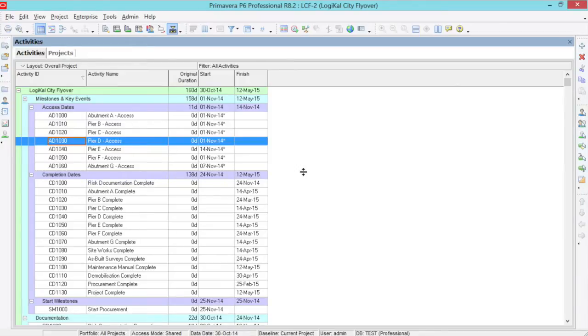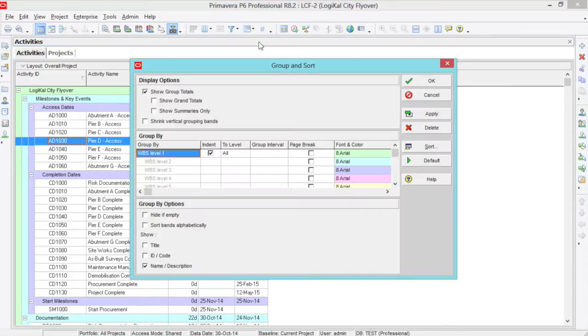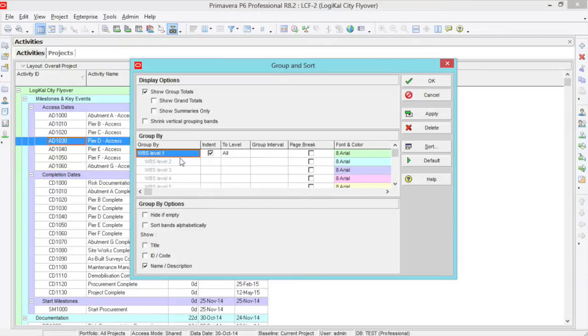So how do we group and sort by WBS? Click the Group and Sort button on the ribbon, then customize. Now here in the Group by column we can set WBS. This is usually the default already. There are many other options here as well.